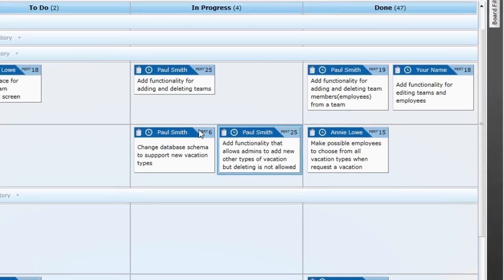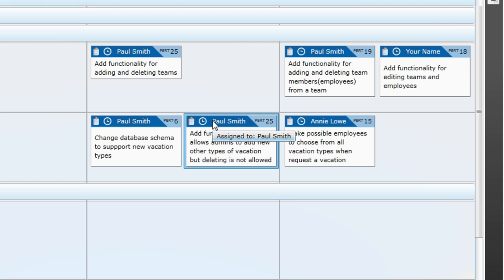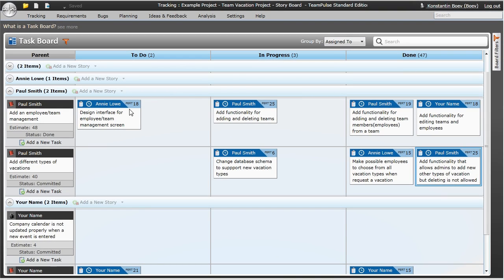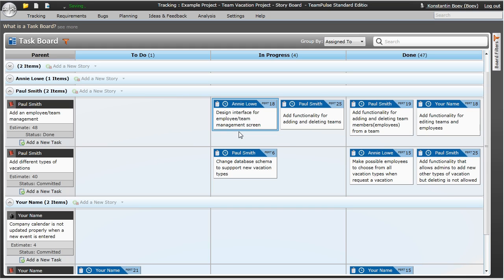On a day-to-day basis, our teams all use TeamPulse to manage their Scrum. So for their daily stand-up meeting, we use the storyboard and task board modes to really look at what our progress is, what we're planning on accomplishing today, what the status of those things we said we were going to accomplish yesterday. Really looking at getting that visualization of progress.